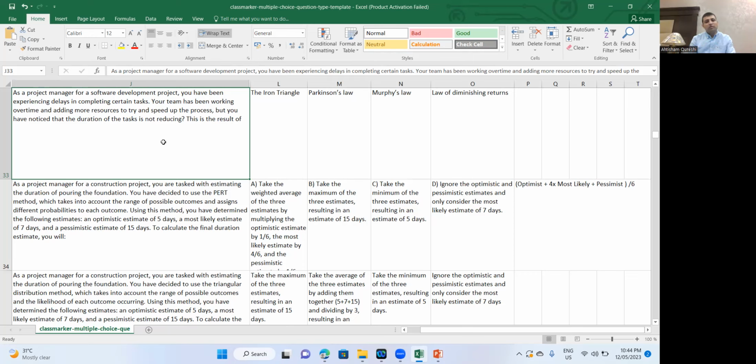If you try to manage costs, definitely you need to look at time. If you want to manage time, sometimes to reduce the time you have to invest more money. And the scope depends. If it is fixed, then you can't do much about the scope, so you have to manage the other two ends. So that is your iron triangle of constraints, which is scope, schedule, and cost, which compete with each other.